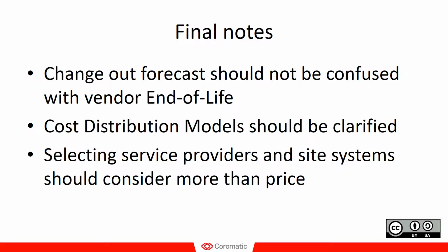So some final notes on the life cycle and financial management process. That is that change out forecast should not be confused with the vendor end of life. It's far too often that I meet individuals that say end of life when they talk about change out forecast, or believe that they have to change something just because the vendor has set this to end of life.